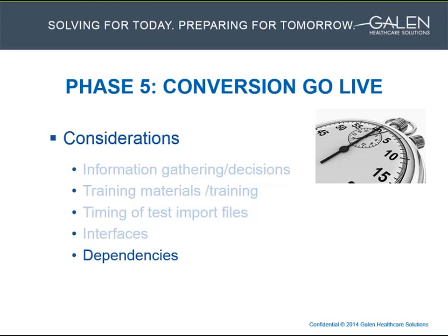Now we get to our last one here on this slide, and that's dependencies. Always important to keep an eye on are those tasks that must be completed within a certain time or before another task can be completed. On a big note, it would be, import files must be created before the conversion can be done, of course, but there are lots of small examples to keep track of too, such as the results verification we already talked about.